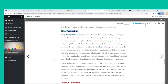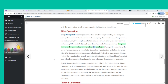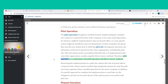The pilot operation changeover method involves implementing the complete new system at a selected location of the company. A new sales reporting system might be implemented in only one branch office, or a new payroll system might be installed in only one department — this group is called the pilot site. During pilot operation, the old system continues to operate for the entire organization including the pilot site. After the system proves successful at the pilot site, it is implemented in the rest of the organization, usually using the direct cutover method.